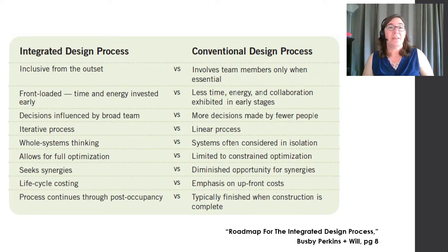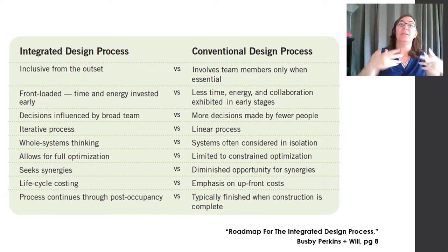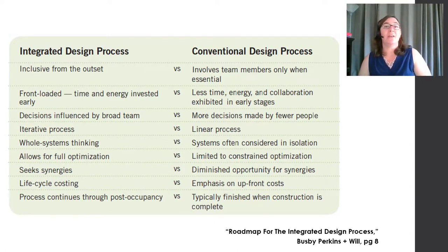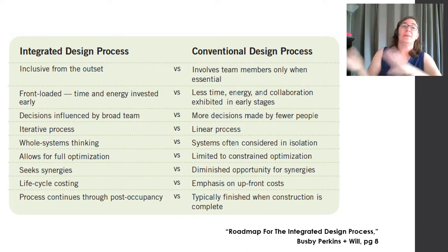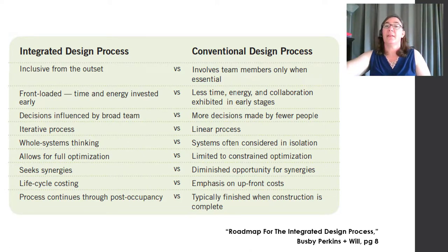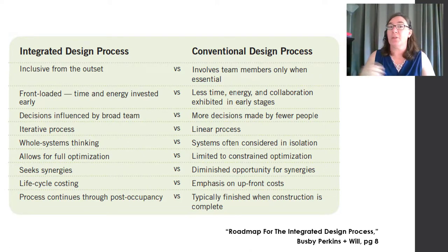Let's compare these two processes. On the left, we have the integrated design process, which is inclusive from the outset, from the beginning of the project. And on the right, we have the conventional, or we've been calling it the traditional design process, which involves each team member only when they're essential, right? Bringing them in a little bit later. Integrated design process is front loaded. Conventional design process has less energy and collaboration in those early stages.